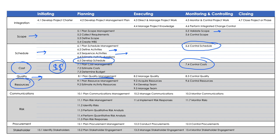Resources — what physical or human resources are required? We acquire them and keep controlling them. For example, when I need to release testers I release them, or get developers or different skill sets as needed. Communication is how I plan what to communicate — meetings, emails, storage systems like SharePoint or Wikipedia, and escalation plans are all part of communication. Procurement covers buying things from outside and monitoring vendor productivity.